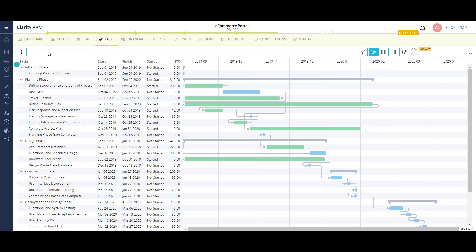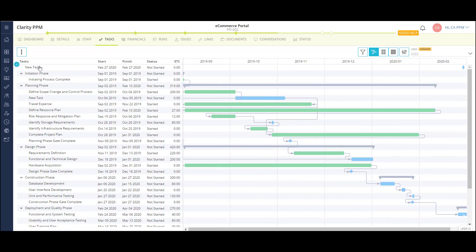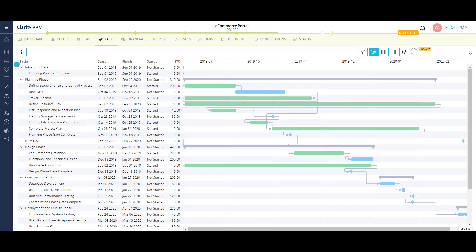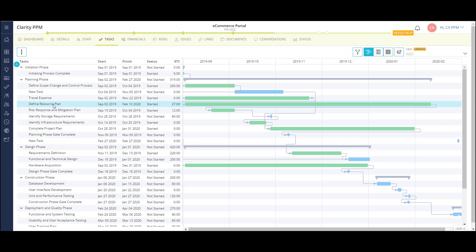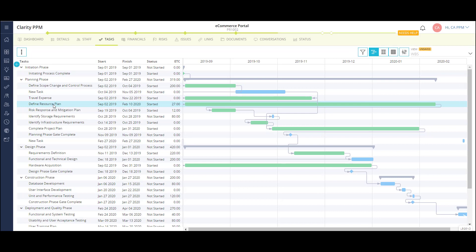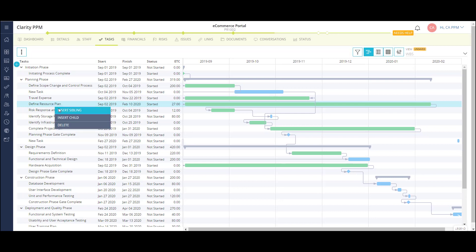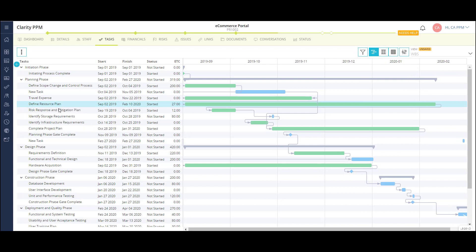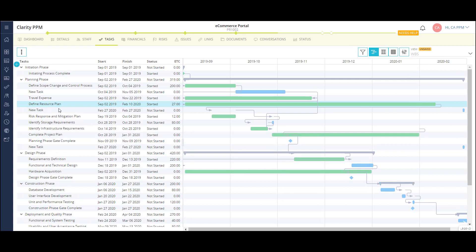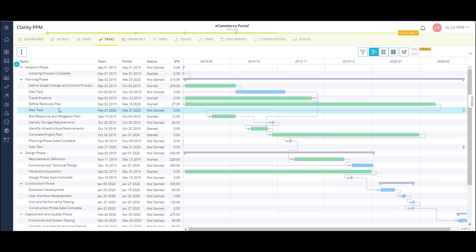When I need to add a new task, I can click the plus icon to create the task and then drag the task to its place in the WBS. Or I can click within the WBS itself and add the task directly inline as either a sibling or a child task.